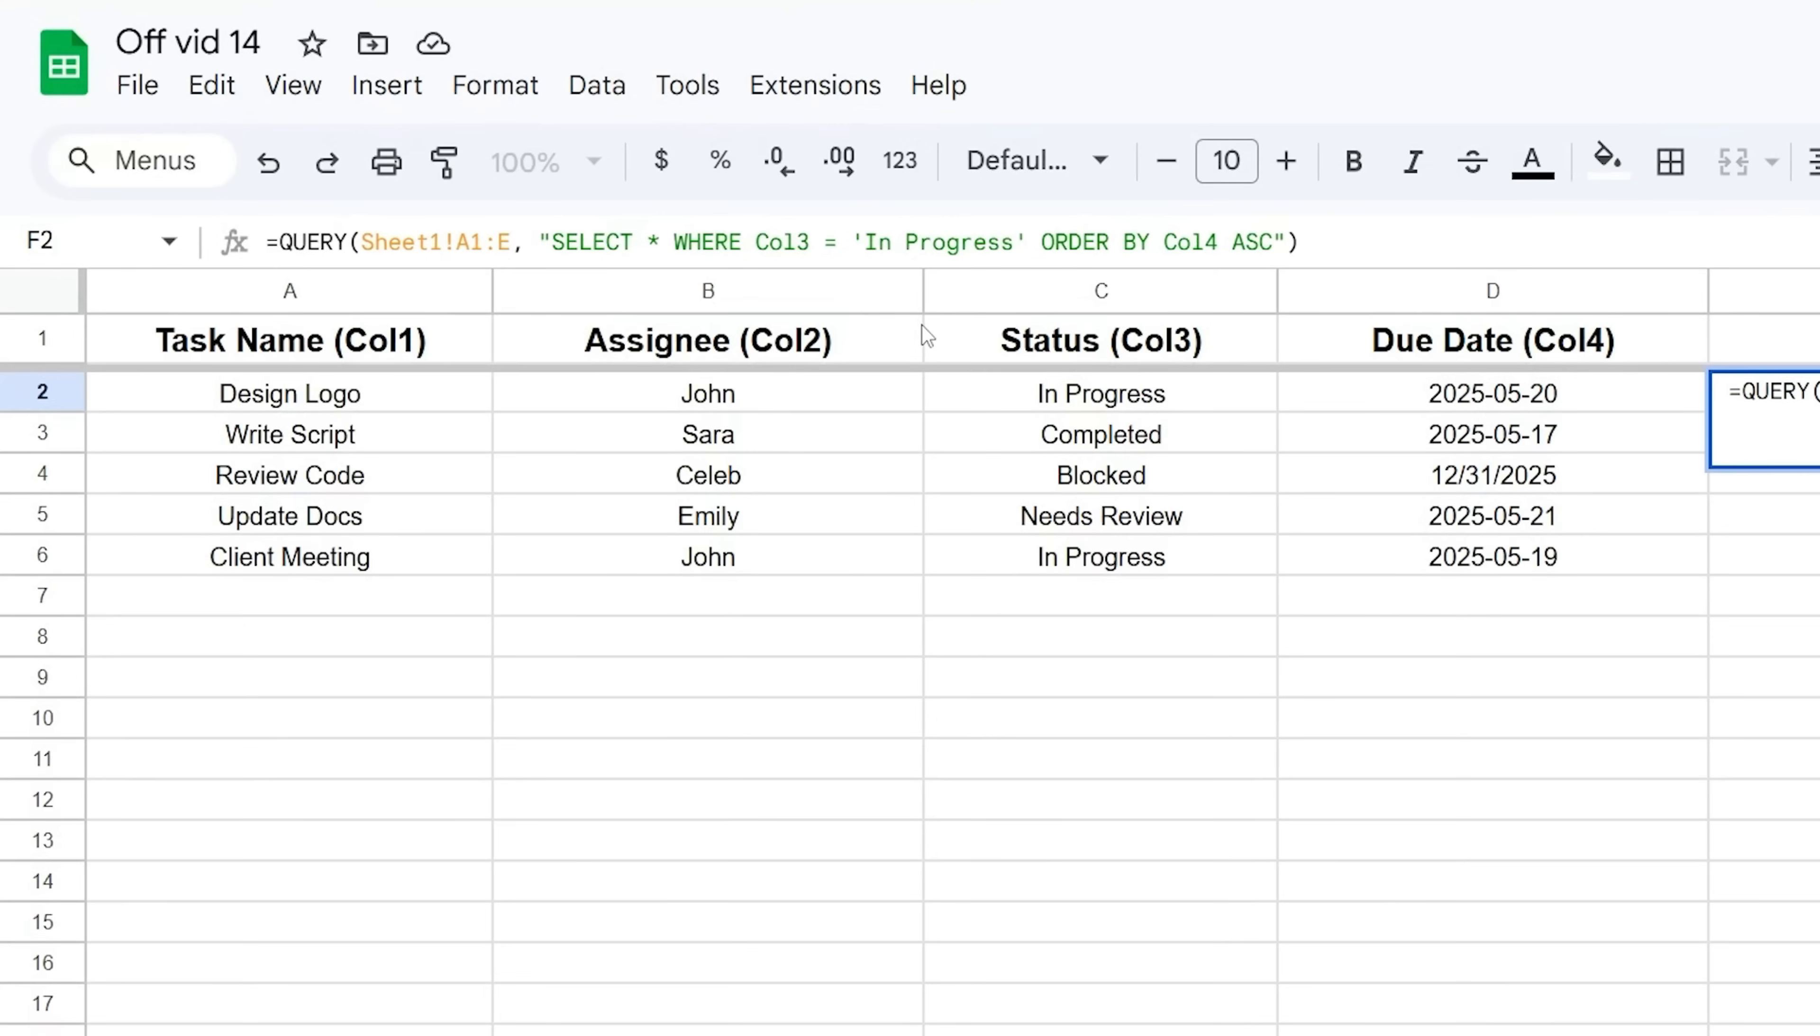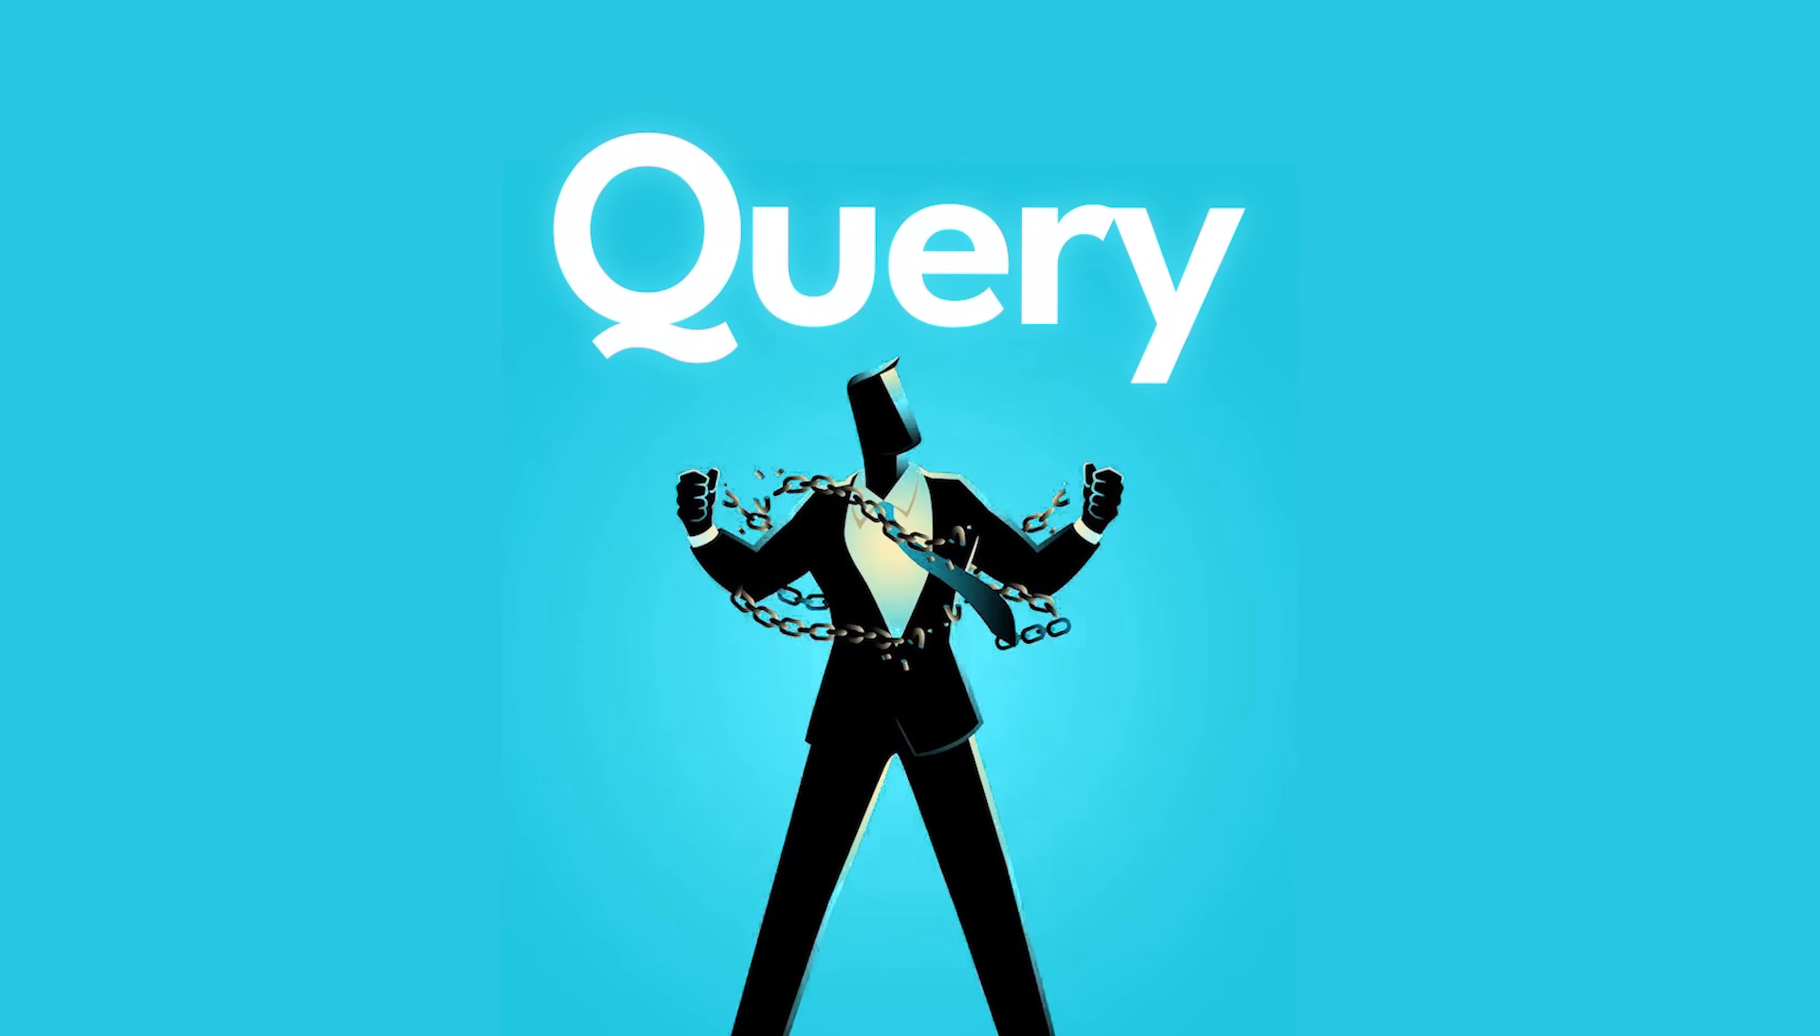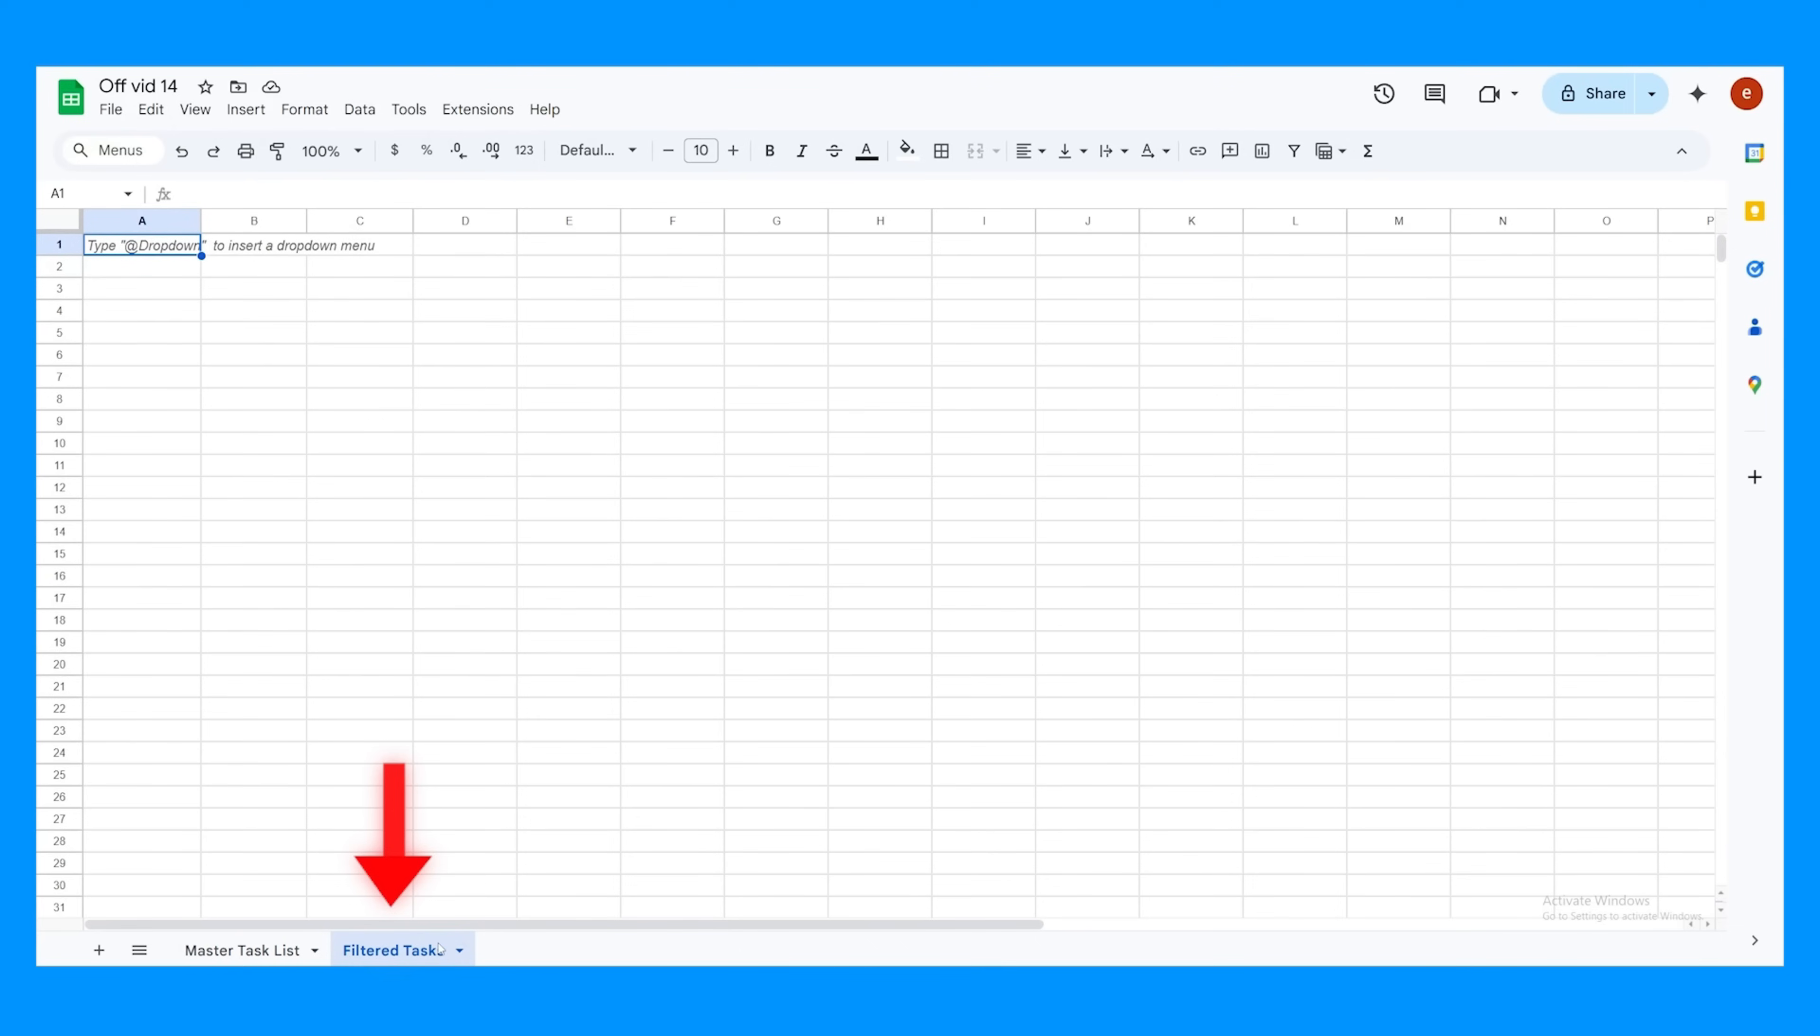You put these pieces together inside the quotes, usually in this order: SELECT, then WHERE, then ORDER BY. Here's where it gets powerful for you as a project manager. You can put this QUERY formula on a separate tab. Maybe you have your giant master task list on one tab, and on another tab called 'Urgent Items', you put a QUERY formula that pulls only high-priority tasks due in the next three days.